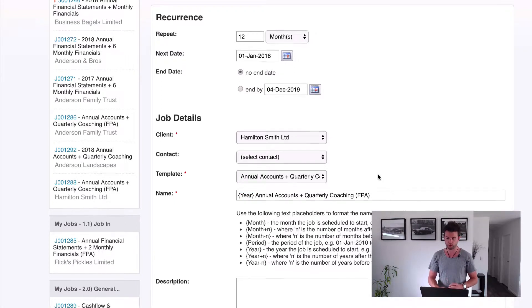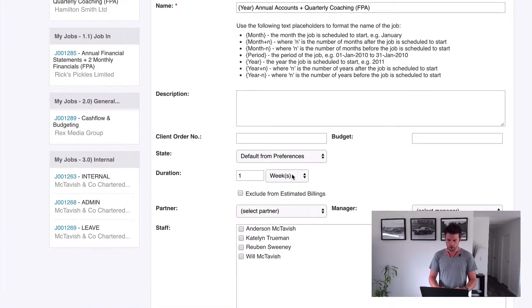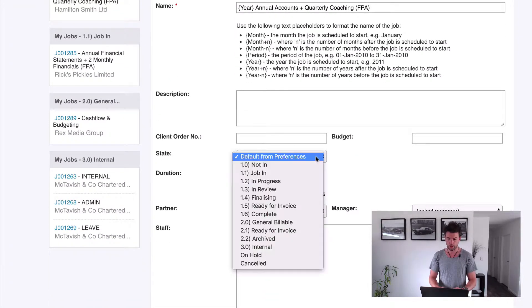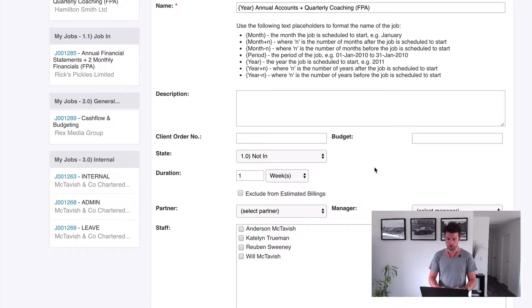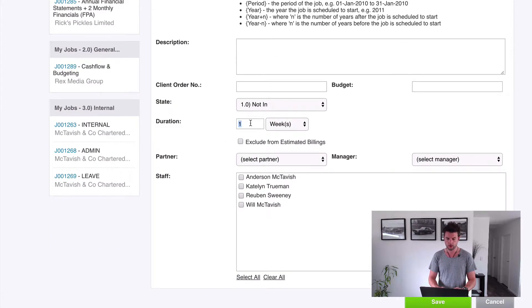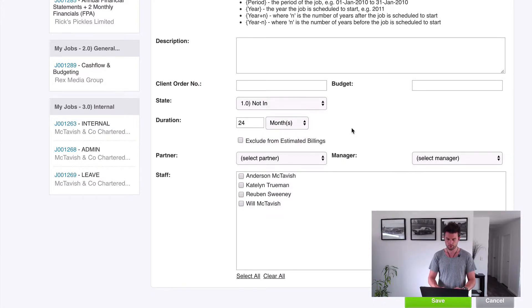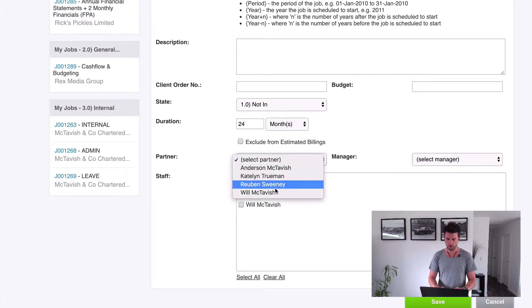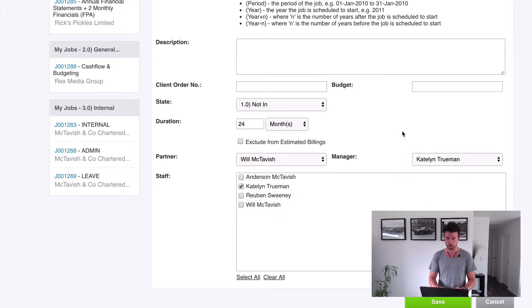This one here, all we're going to do is say current year Quarterly Annual Accounts plus Quarterly Coaching. Now don't worry about description, client, or number of budget. We're going to choose the job state to be not started. The duration is going to be 24 months. And then if we know the partner, we're going to put these in. Let's make it in the job manager and Caitlin working on the job. Great.